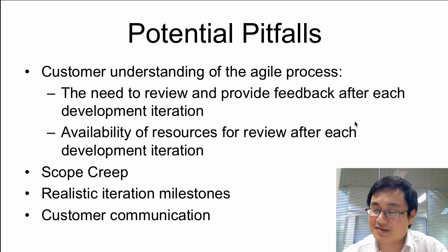Lastly, but not least, is communication with the stakeholder. Weekly project status update reports and meetings are a good way to keep the stakeholders informed of the progress of the project. Also, after each development cycle, I make it a practice to personally demonstrate the newly developed functions as well as any new fixes from the last iteration to the customer.